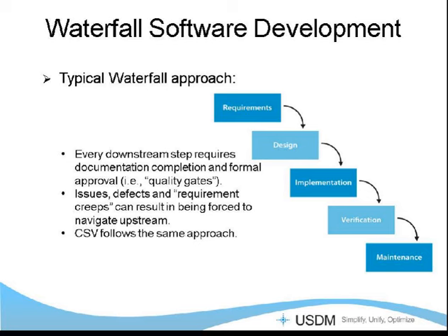So this is the standard waterfall methodology that we all know and love. We're going to do requirements, we're going to sign off on those, then we're going to do the design, and this is really building up to that control and that contractual agreement between the business who defines the requirements and the folks who are actually delivering those requirements. Again, if it's outside of that scope, then we just don't build it. We put it in a future phase, or we do a change order to actually make the change and change the timeline, change the budget, and all the rest of those things.